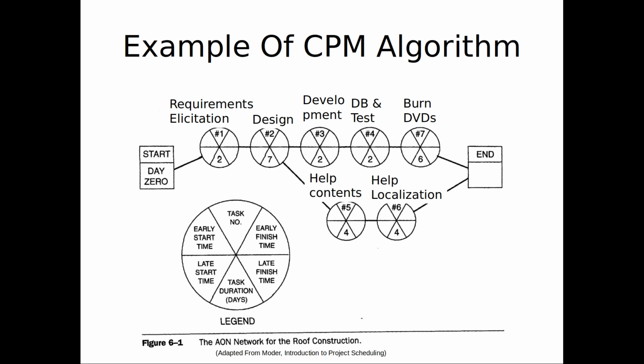Meanwhile, going forward, the forward pass, we're taking the maximum of these two, right? Here, because we're asking, when's the earliest we could possibly finish it? And if even one of these goes late, we have to take the maximum. Do you understand that point?